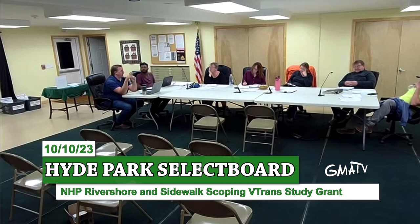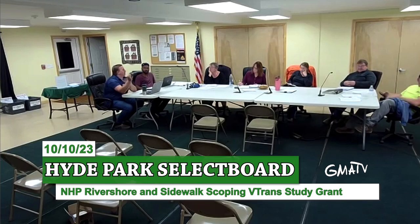Town of Richmond did a two-part thing this summer where they put a new sidewalk on Bridge Street right in front of their town office. The highway crew did all the removal, excavation, and subgrade, and they hired a contractor to come in and put in the curbing and the sidewalk and the paving and ADA bumps that have to go in. They didn't do that part of it, but they did all the demo as a way to share that cost.